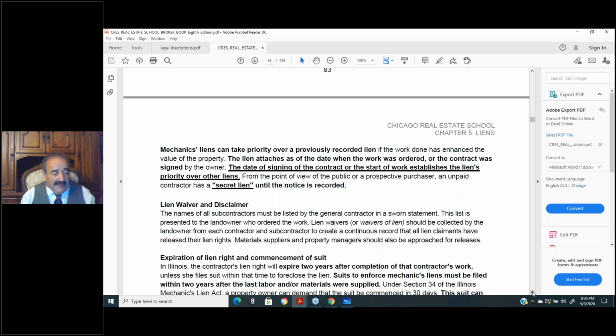But I did not pay the material men for the materials. I did not pay the subcontractors for their work. Even though you have a receipt paid in full, you have a canceled check that you paid the general in full, because I did not pay the subcontractors or material men, the material men and the subcontractors could come after you, the homeowner, and they could get paid again. You think this stuff happens all the time.